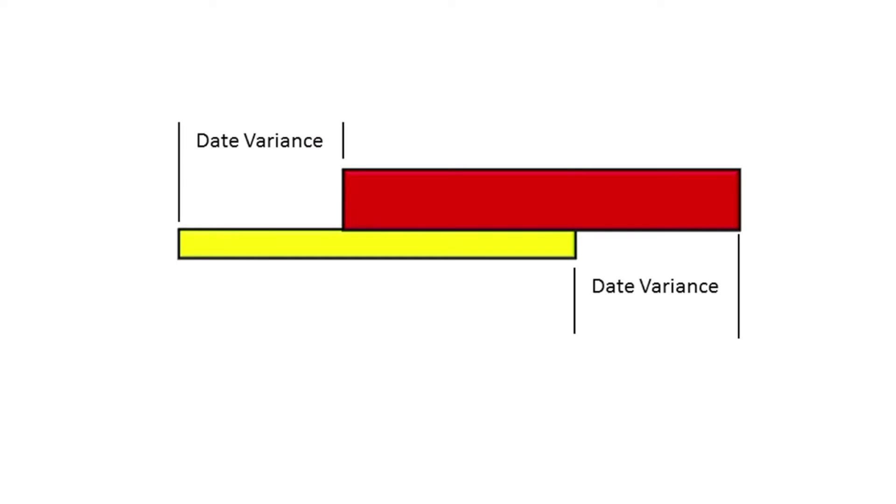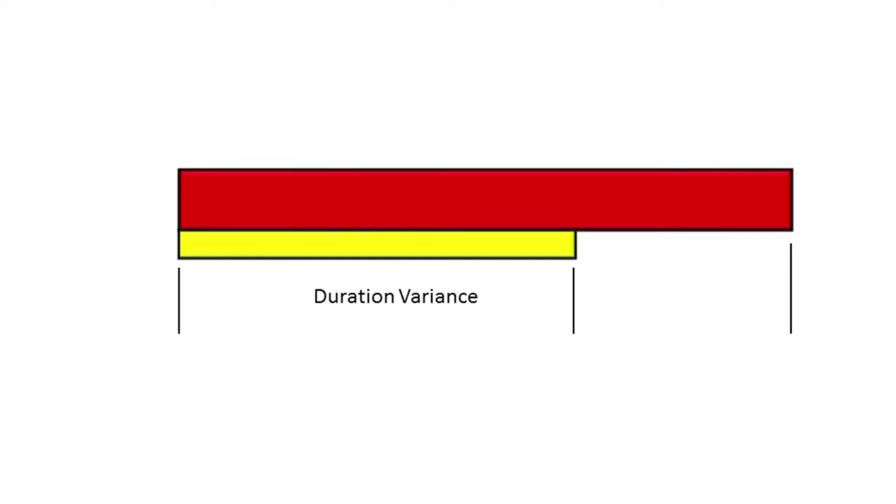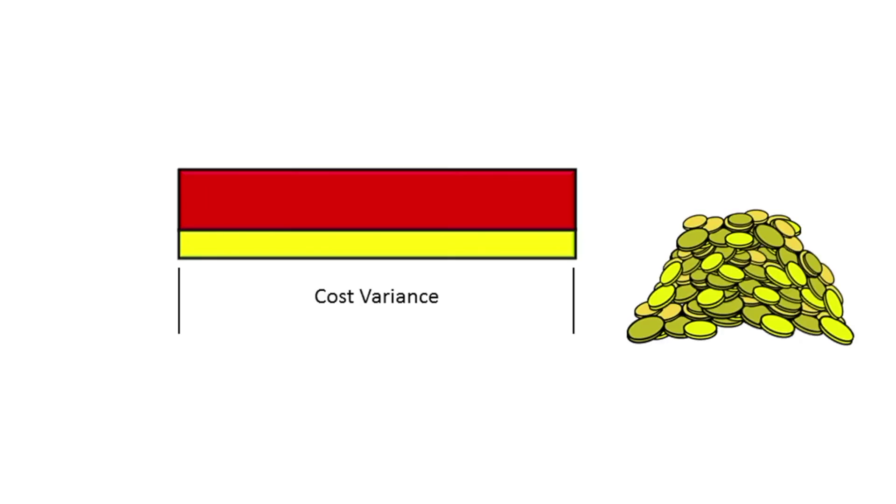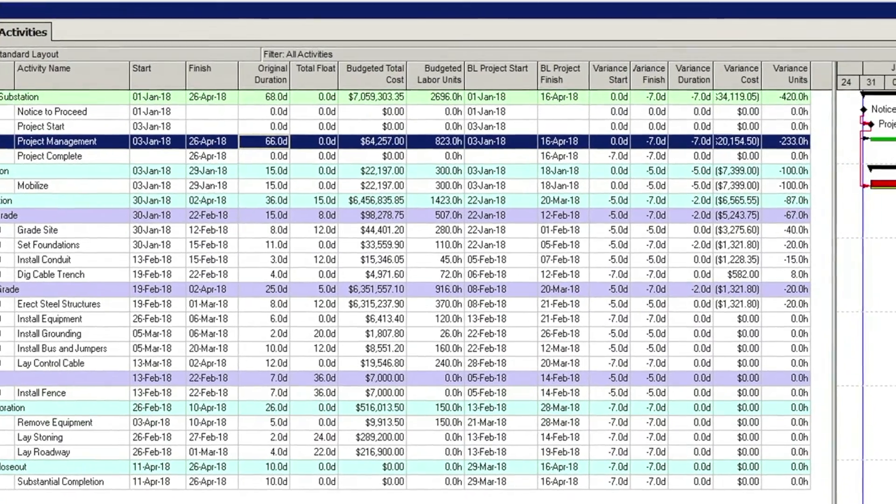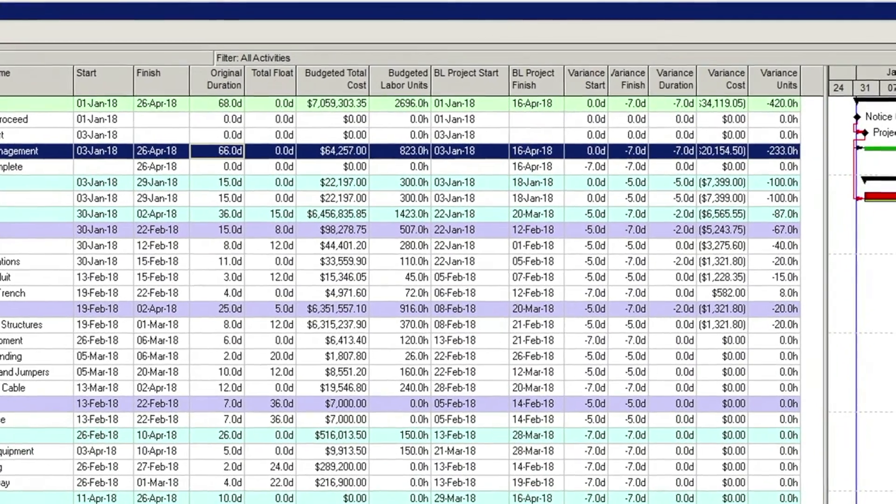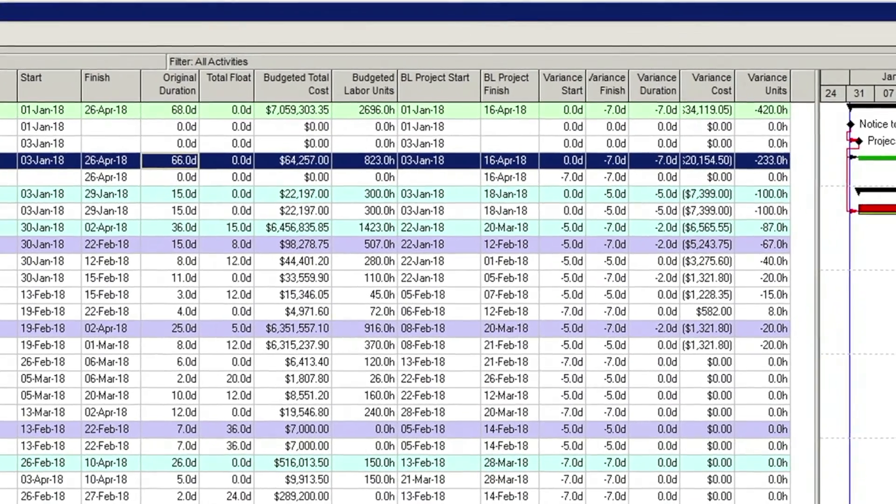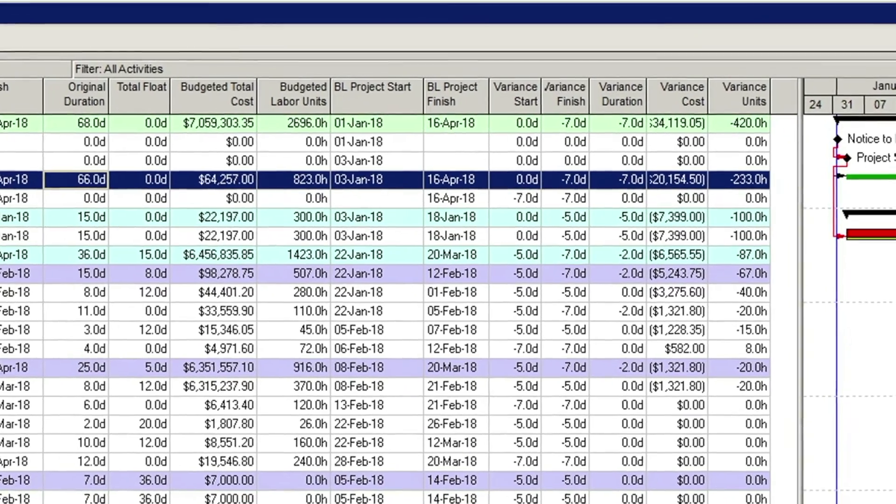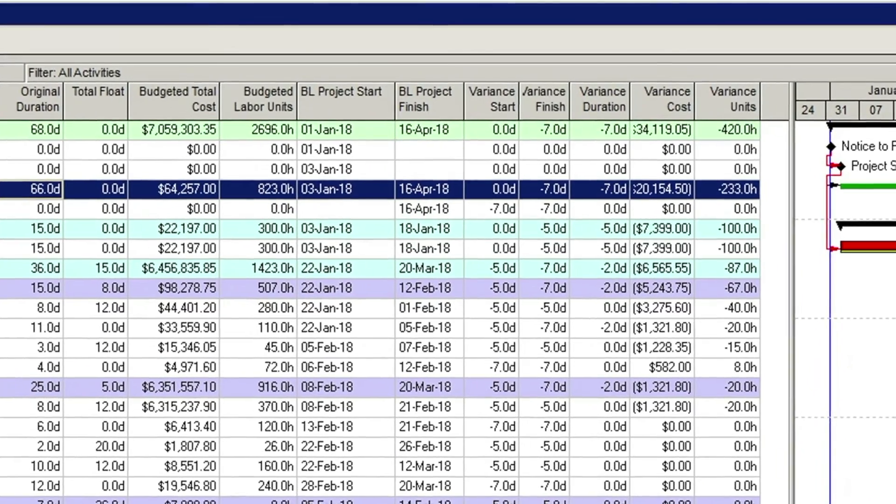As the current schedule changes, you can compare it with the baseline and see variances in dates, durations, costs, and so on. These variances can be used to quantify the extent of deviation from the original plan.